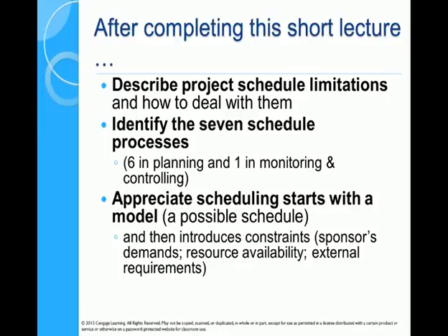And the main thing we'd like you to get out of this lecture, and also your labs, is that scheduling is a model. It's a model of what's possible. That model is going to be then affected by constraints. Reality kicks in. We need the model first to see how best to cope with additional pressures or constraints on schedules. Too often people just start with the constraints and then come up with unrealistic schedules to meet those constraints.